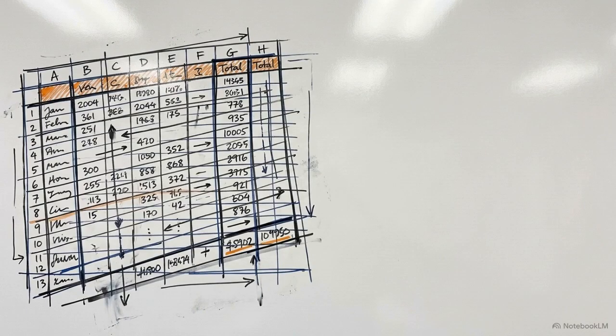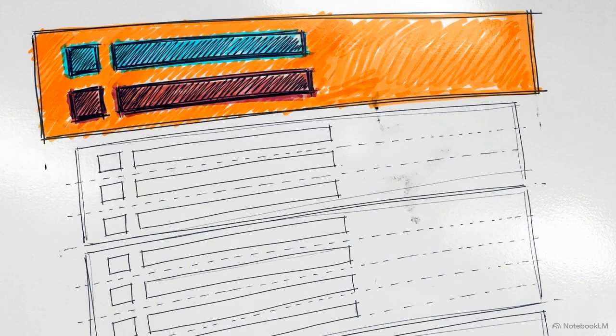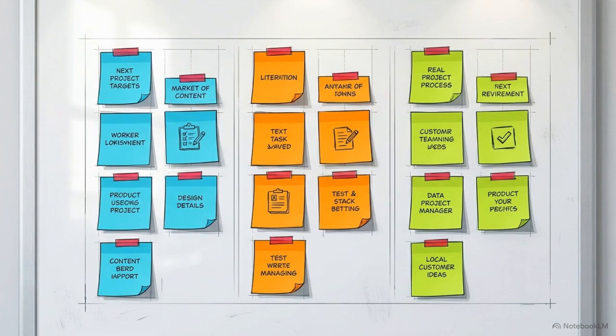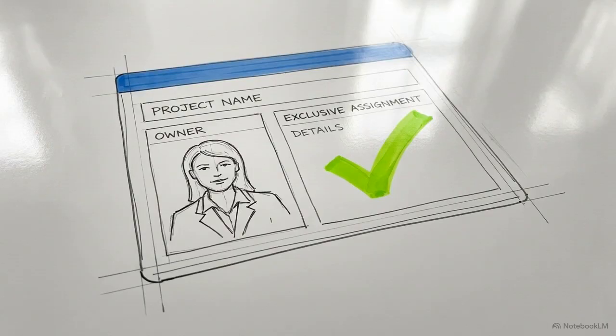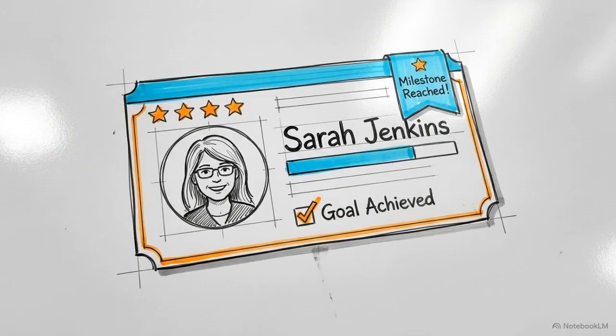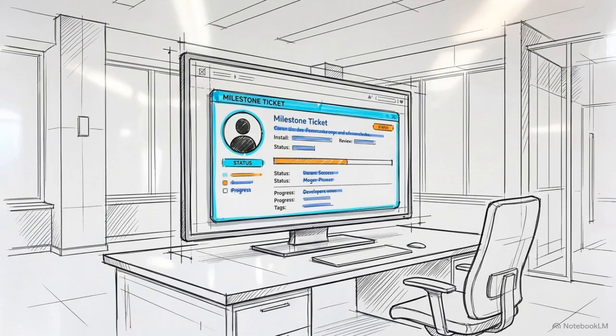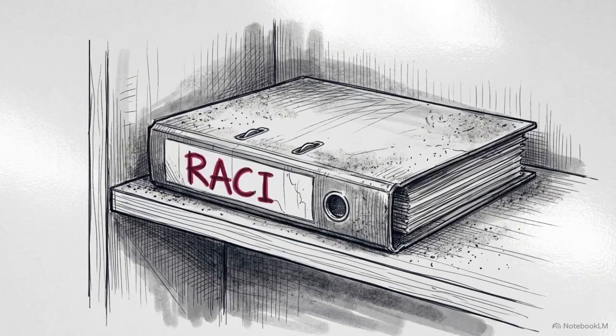Next, establish tiers. Group scored milestones into 3 categories: critical, structural, and informational. Cap your Tier 1 list at a strict maximum of 20%. If half are critical, the label loses its function. Force the distinction. By removing your chronological bias and enforcing a strict 20% cap, you transform a flat spreadsheet into a clear, actionable hierarchy of the exact items you need to defend.